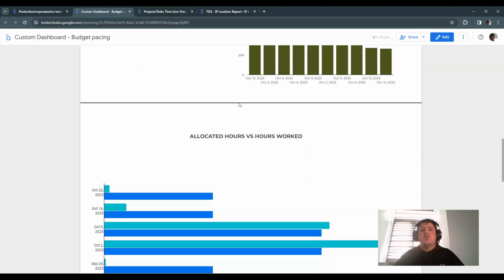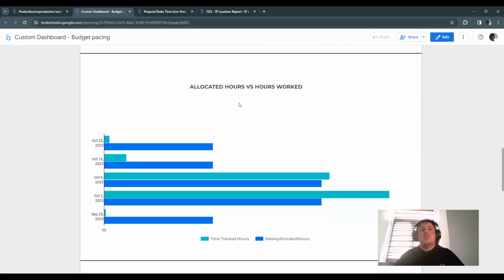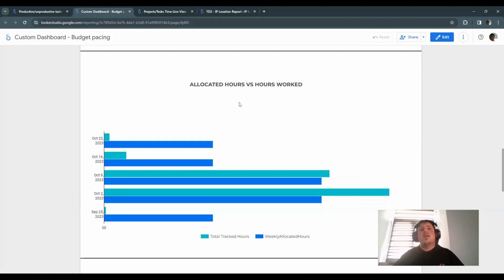The way we achieve some of this data is to take the hours that are allocated per specific billable task versus the hours that are actually worked on those specific tasks. And in this, we are also able to see if further resources are needed to bring down those specific times, if more hours are being worked than what should be allocated to an actual billable task.